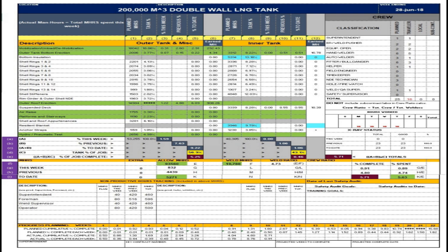Row F. Planned man-hours, that equal 93,560 man-hours, represents the sum of planned man-hours taken from cell 1A plus cell 7A. Here you also have the man-hours planned to do weld work that equals 19,788 and the weld ratio with respect to planned man-hours that equals 4.73.